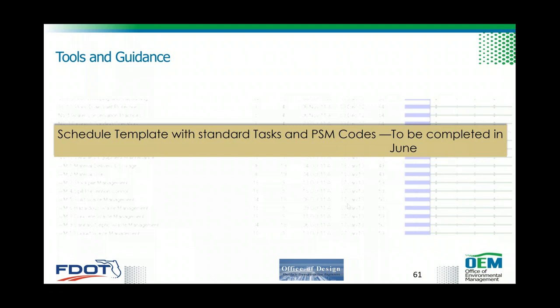Having no schedule does not prevent you from doing one of these projects. As a matter of fact, I told you that the process is flexible, so we don't want to limit you to whatever template we give. The template is going to be an initial starting point with major milestones. You have to know that if you have to approve NEPA, you need how many days with the district review, central office review, and our director review before he can approve NEPA documents. So we're going to be attaching those days and timelines in there and provide more guidance on that.